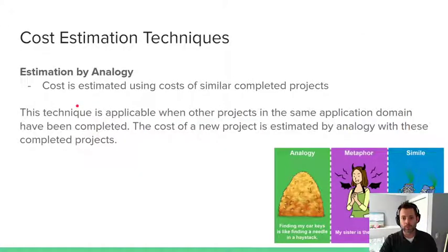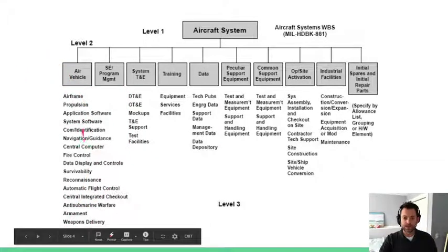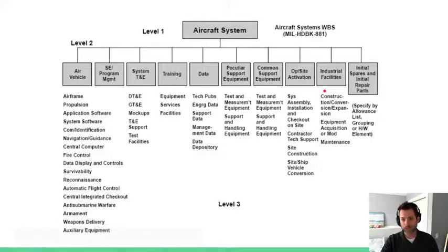Now, where we can kind of get into problems with this estimation, let's say that we assume that everything is going to be great. We're going to build our air vehicle. It's done in a year. However, oh crap, we forgot about housing the thing once it's built. So we don't actually have a facility to store a plane in until 3 years down the line because this space is being rented out by a competitor. That impacts your cost estimation. So we need an extra year to maybe build a facility on top of that, or we have to rent something else out. All these pieces get kind of jumbled together in one overall estimation, and this would be broken down too, right? You'd have numbers for each of these.